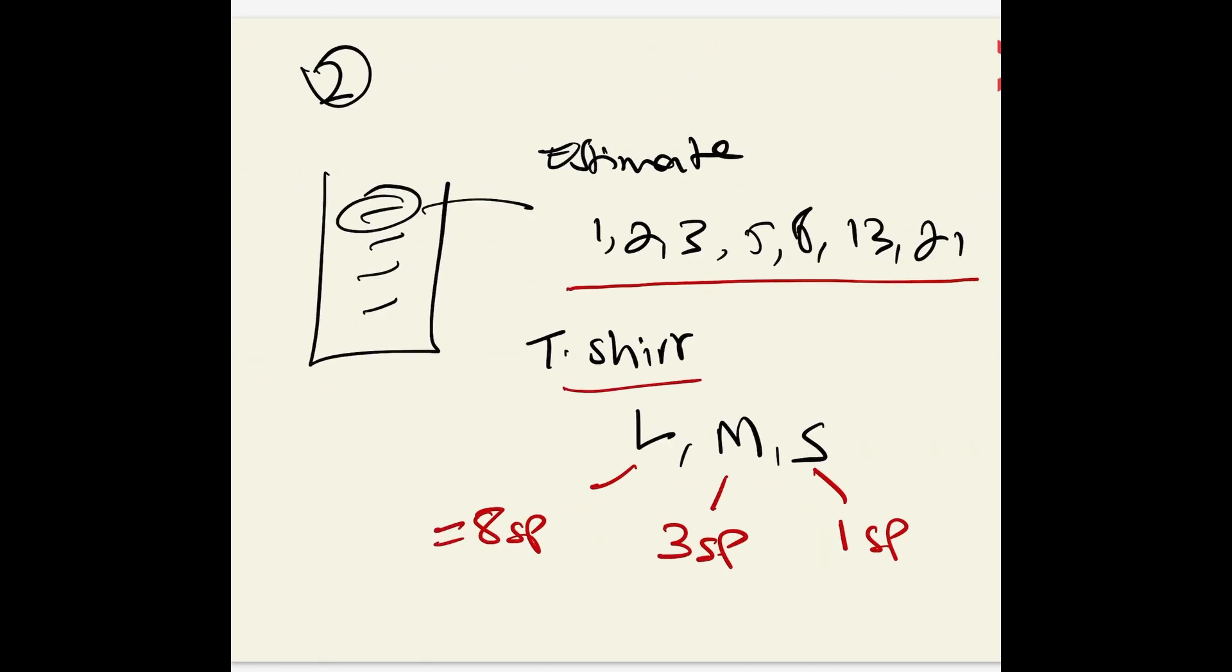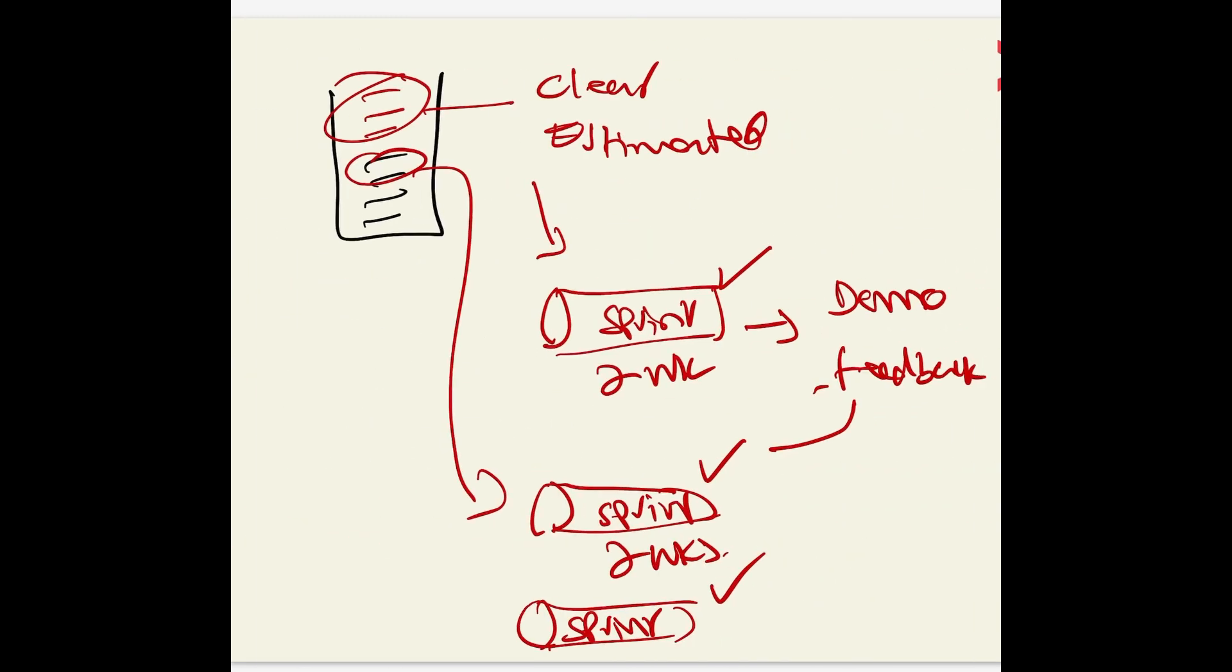Once you've done that, you need to estimate them using the Fibonacci sequence if possible, if not t-shirt sizes which is large, medium, and small. Then once you've done that, you can start planning for your sprints.